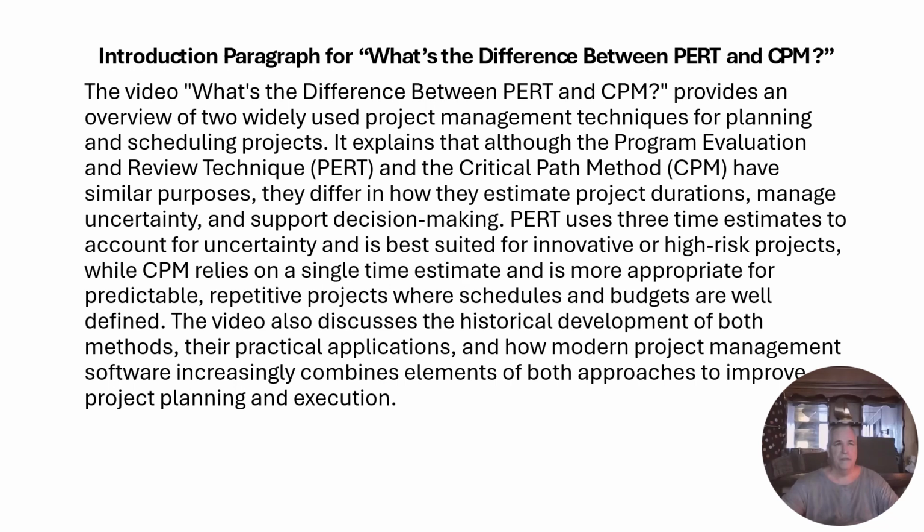If software testing is delayed, I would use CPM to identify the critical path and determine which activities have no slack. That would help me decide where additional resources or schedule adjustments could prevent further delays. At the same time, I would use PERT to evaluate activities with greater uncertainty and develop more realistic timelines and contingency plans for tasks that carry greater risk.